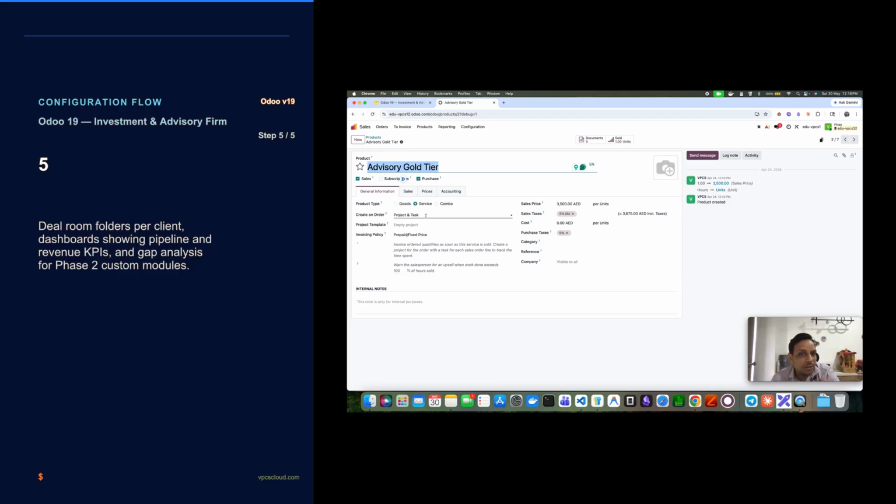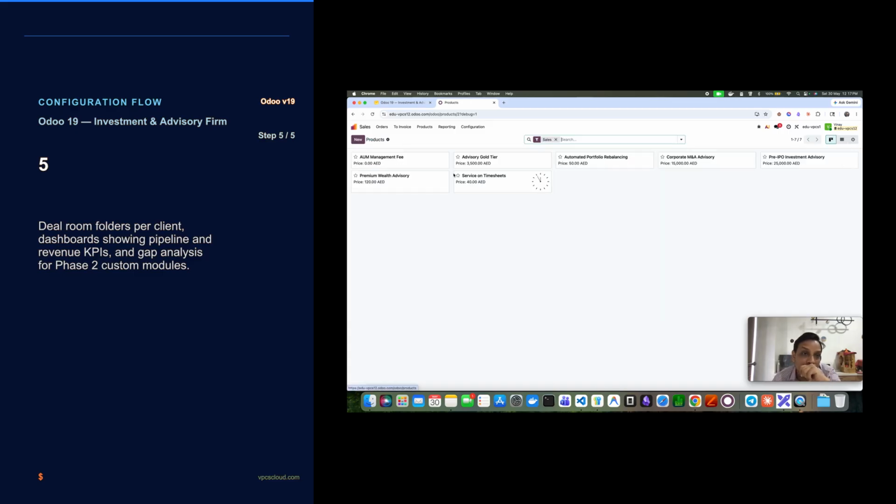So when we create this particular product in a sale order line, it will generate a project automatically. And based on that project and task, we can link the template also. Like you can prepare a template of project and task. That project and task template is also linked with that. And when it generates a project and task from sale order confirmation, you have all tasks and projects available according to the template assigned. So that is also possible.